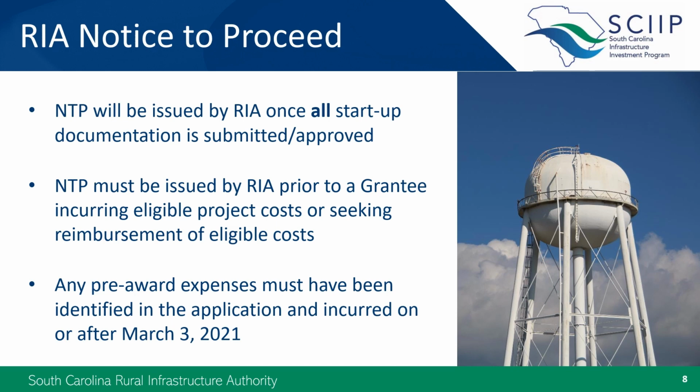And this should generally not take more than 6 months for the grantee to submit required documents. However, a grantee can be moving forward on procuring an engineer. You just can't enter into the contract until RIA reviews. Likewise, any local match activities could and should be underway while clearing any special conditions or startup activities.